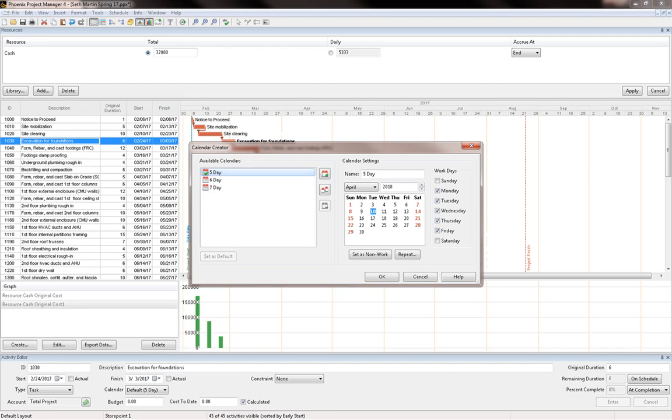Assuming that, for example, our project is going to last for a year. Are we going to work on the 4th of July? Probably not. Are we going to work on December 25th, Christmas Day? Probably not. So let us designate these as non-work days, so that if work comes through these days, it's going to jump over that day and count the following work day as a continuation of the previous work.